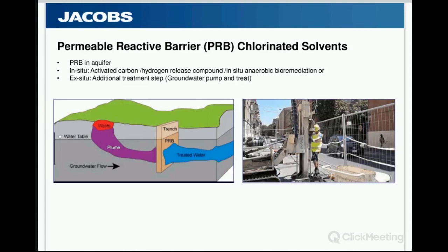I'm always a big fan of perma-reactive barriers, but when we're dealing with a trace DNAPL that's going to have a long duration, in excess of 40 odd years, it's problematic, certainly in this environment, which I can't really describe because of the confidentiality. So we are just about to implement a trial. That trial is going to cost £150,000,